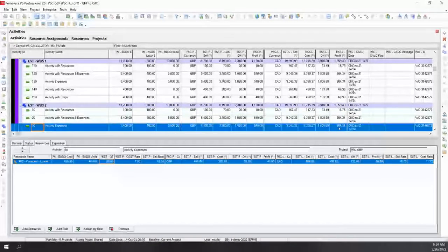Again, with costing, we've done many different flavors with working interest, with different foreign exchange rates. Now, in this example, I've got it at the project level, but we've got examples where we've done it down to the resource. So a particular work package might be purchased in US dollars from a US contractor, and that calculates back to Canadian.